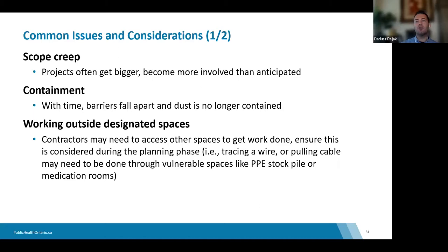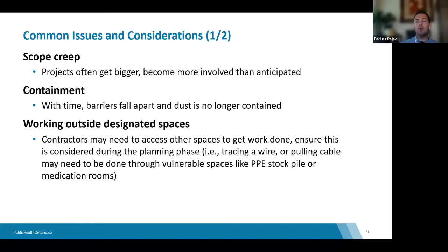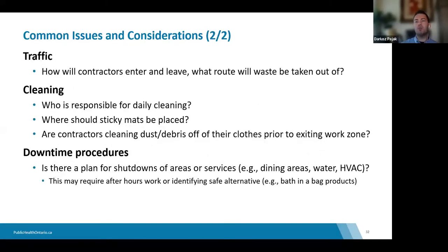With containment, you want to recommend appropriate timelines. For longer projects, more solid hoarding like drywall is required rather than just plastic sheets, so project duration is very important to consider. Another issue is projects that outgrow their predetermined workspace — other spaces will often need to be accessed in order to complete the work.